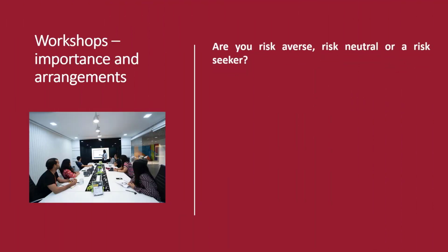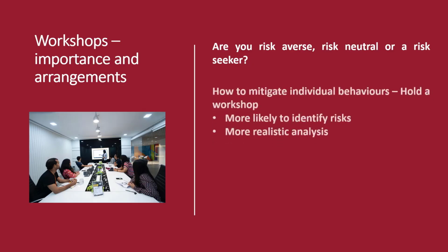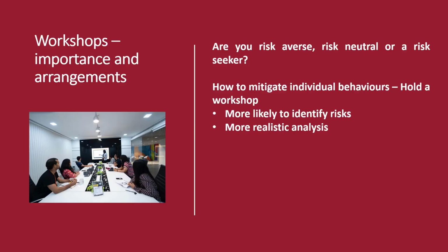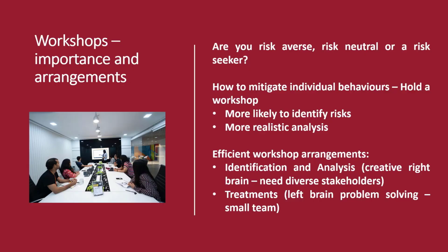Let's start with why risk workshops are so critical. Are you risk averse, neutral, or a risk seeker? On a range from chess to, say, hang gliding, where would your hobbies lie? The point is that we all have different experiences and view specific risks differently. Holding risk workshops brings diversified experiences to the table to better identify risks and reduces individual bias when allocating analysis values. So a risk workshop is essential, but a further simple step can really reduce participants' time, and that is to split the workshop into 2 parts.